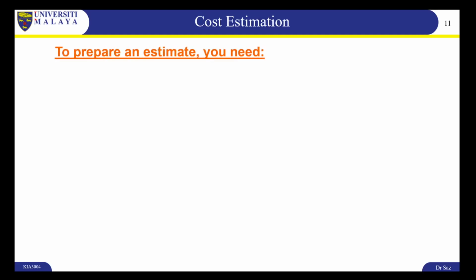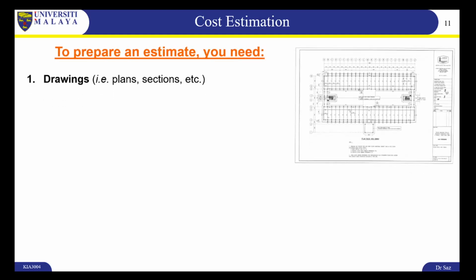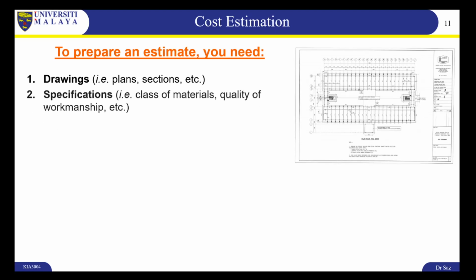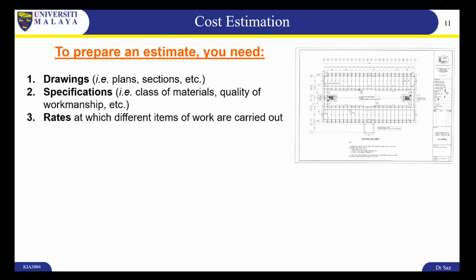To prepare an estimate, you need drawings, specifications, and the rates at which different items of work are carried out. An example of a rate is how much does it cost to pour 1 cubic meter of concrete, for example.